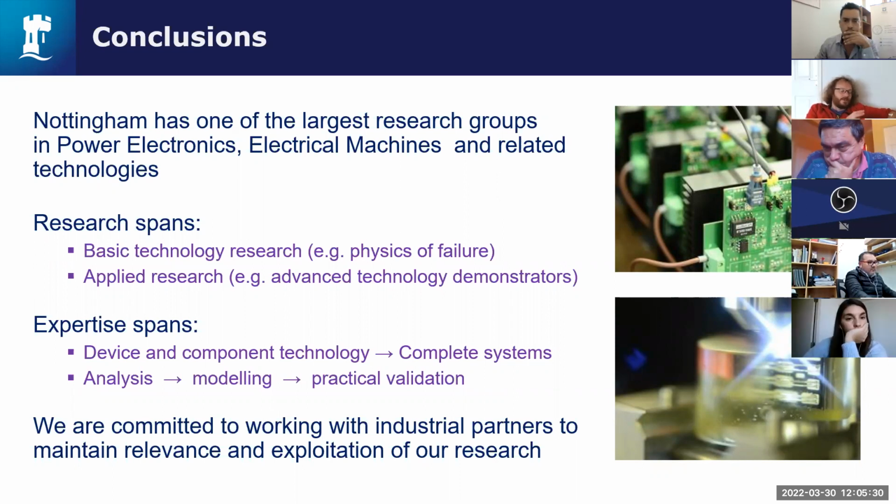So with the big, well-funded projects, that is a really good technique. You use the finance, and you don't pay people for their research work unless they've delivered the research they said they were going to deliver. And you do that through good project management.